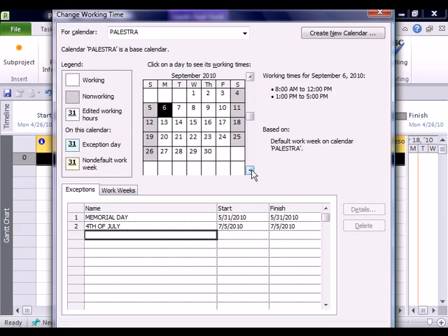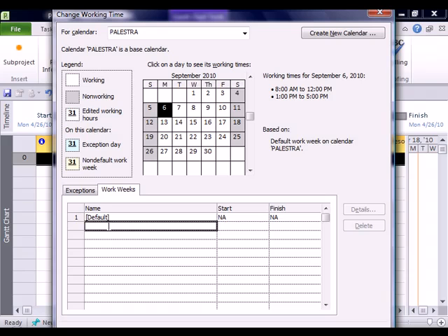But when you go through this, you'll want to just mark off days and make sure that everything is lining up. You'll notice that there's another tab here. It's called Work Weeks. And Work Weeks tabs basically are any weeks that are different from normal work weeks. For example, let's say you have a half day on one of the holidays or something like that. So let's say I go back up to July. Let's go down to July.